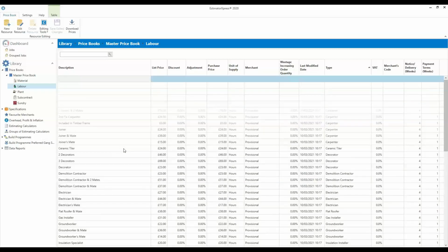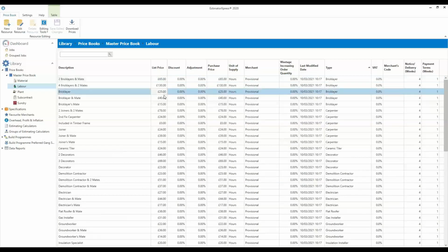They're all in here, and they all have a guide price. We do recognise that, and every single demo I do, I always end up changing it in here. But what that £25 is representing is, if you multiply it over an 8-hour day, just to make sure my math is correct, it should be £200 a day. Yeah, you're looking at about a £200 a day rate.